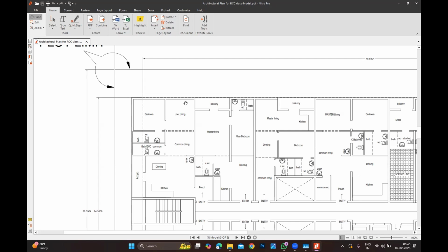Make sure that if the depth of the formation is more than 5 meters, don't try to place it as I will be 3 plus. The authority will never take that risk. Up to 5 meters only, the authority will permit to go for IV plus. We submitted several projects and got rejections from them.